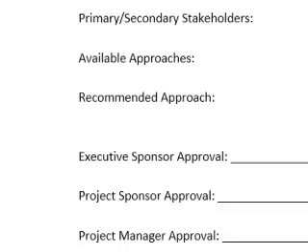We had the students start after the class was done in the evening. So in this case, the class is done. You could start them at 7 and have them work till 9, 2 hours in the evening. It takes about 3 or 4 days per lab, so do 1 lab a week and you're good to go. And you can have 2 students work on the 3rd lab on the last week and cut the days in half. You may have 1 student or 2 students working in the same lab in each day.